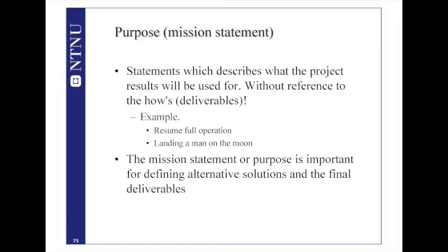Because the old method did not produce these accurate reports, and they wanted a software hardware solution to make sure that the status of the runways, where the planes land and take off, should be accurate at all times.